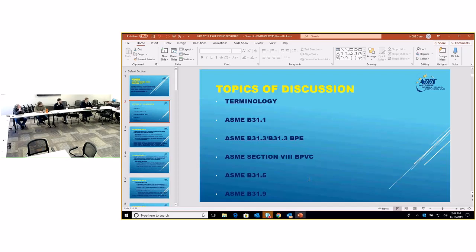And the more that's on the drawing, on the cover sheet, when the building plan reviewer reviews it, and the mechanical reviewer reviews it, everybody's okay with it, and then the fire marshal shows up and says, throw all of that out the window, we're going to do it my way. But if you have it all on there, you can open it up and say, look, we followed the rules, now you're changing the rules. Yeah, and then you get paid for the changes. Whereas the other way, you don't get paid for the changes.